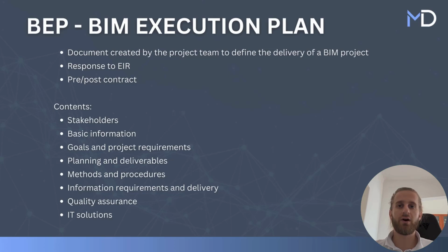Investors want to verify whether you can perform according to the BEP and deliver the required outcomes. Every stakeholder should contribute to the BEP, but generally the comprehensive BEP, which addresses the investor requirements, is produced collaboratively by the entire project team. However, one individual is typically responsible for overseeing the writing and the verification of the BEP. It is usually the BIM manager in cooperation with the BIM coordinator.